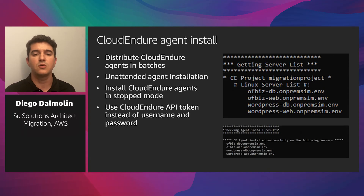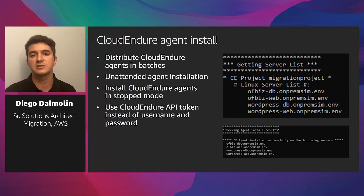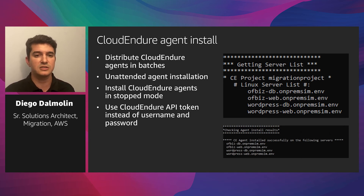The next script is to install CloudEndure agents. My recommendation is to install agents using unattended installation mode, and install the agents in all the servers you're going to migrate as quickly as you can. This is especially helpful for companies that implement change management and require approval to install agents in servers. The CloudEndure agents can be installed in stop mode, so you can start data replication only when the assigned migration wave is about to start. The script should report which servers had agents successfully installed and which need additional troubleshooting.